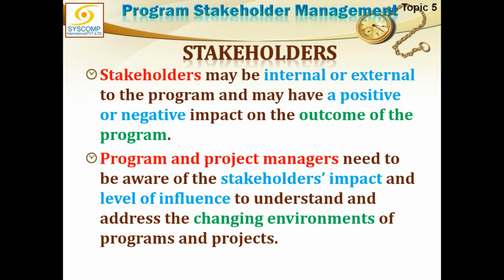We do not have to differentiate between any of them. Once we are identifying the stakeholders, we have absolutely no right to judge them. Don't judge them while you are identifying the stakeholder. Don't classify them as positive or negative or internal or external or big or small. Just identify all the stakeholders. Classification will come later, because classification leads you to a kind of assessment or analysis. And once you have started analysis, then you are basically trying to do the qualitative analysis. You are trying to sort out who is a big stakeholder, who is a small stakeholder, who means more to you, who means less to you.